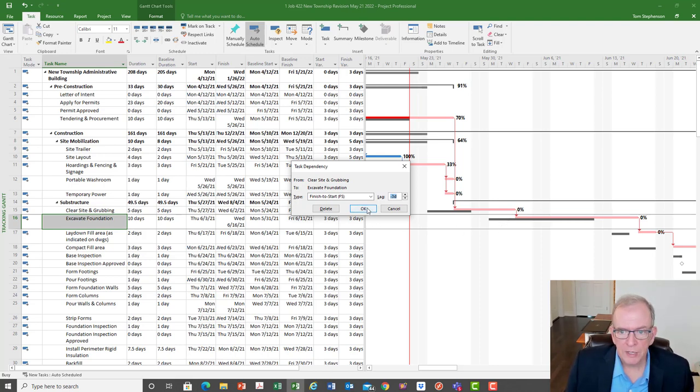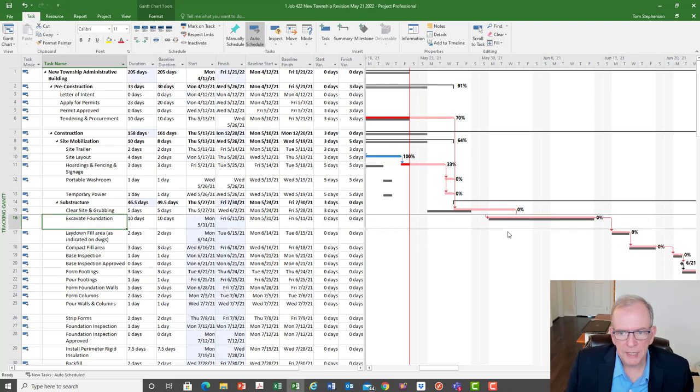So I'll click here and I'm going to click -3 days, and that pulls that back. So I just saved 3 days on my schedule. My project is now back on track. I would make sure if I'm going to do something like that, that I put a note to talk to that particular trade to make sure that they buy into it.